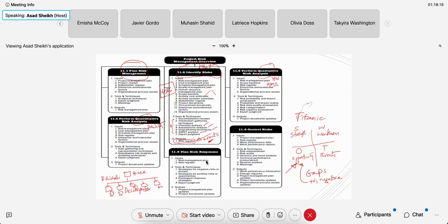If somebody's saying something, okay, another thing I want to tell you right now is the difference between a risk and an issue. Who can tell me the difference between a risk and an issue? What's the main difference? Risk is before it happens, issues after it happens. Yes. So if right now, as I'm talking to you, my laptop, let's say, crashes, that's an issue. On the other hand, if I'm thinking in my mind, what if my laptop crashes, what would I do?